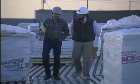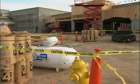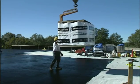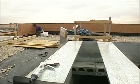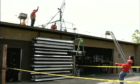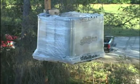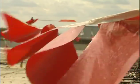Every roofing project has its team leaders. The estimators, project managers, superintendents, and foremen are responsible for most of the pre-job planning. They will designate the ground setup area where materials are stored and hoisted up to the roof. They'll check the building and parapet wall heights, figure out roof access, and choose a setup location on the roof. They know the equipment and materials that will be required, the number of disposal chutes you'll need to assemble, and the necessary fall protection equipment to set up.